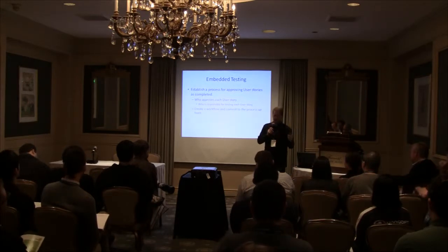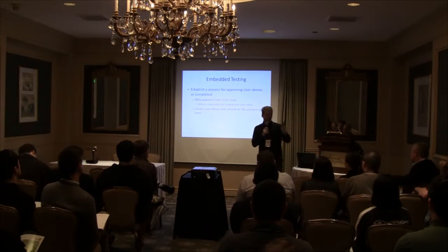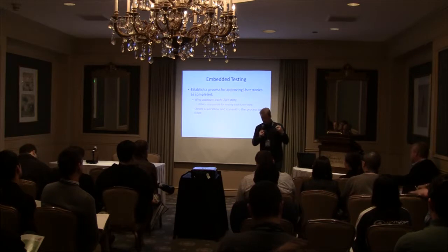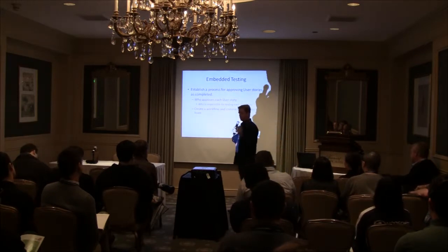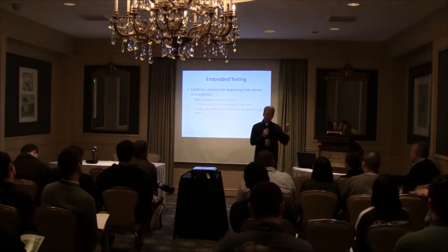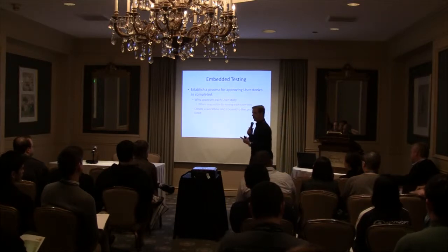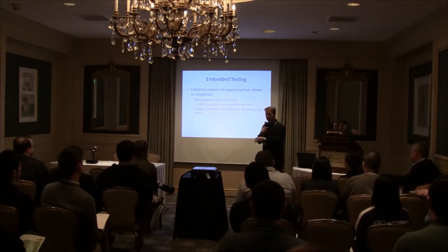For those of you whose studios I've been out to, I was just at one of them. I'm a big fan of when a feature is completed, the first thing it does, before it goes into the daily build, is it goes to QA. QA will test that feature. They'll either approve it, saying, hey, we tested the feature, it meets its acceptance criteria, we found no obvious bugs, we're going to go ahead and allow it to the daily build.